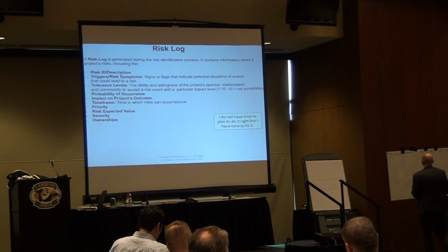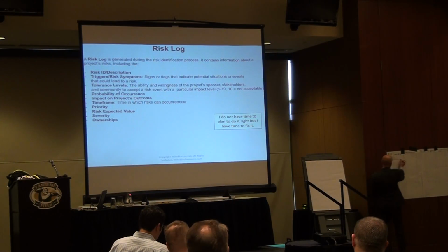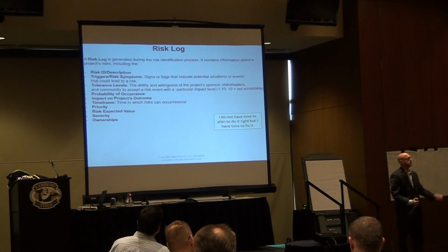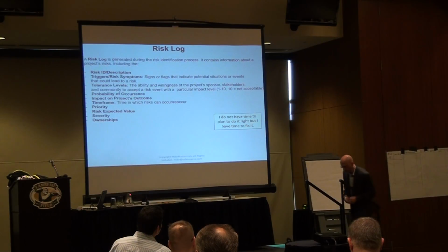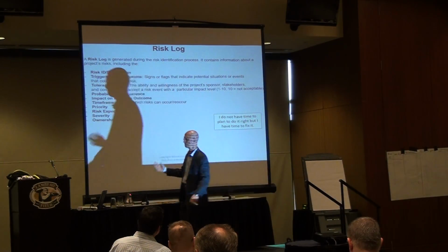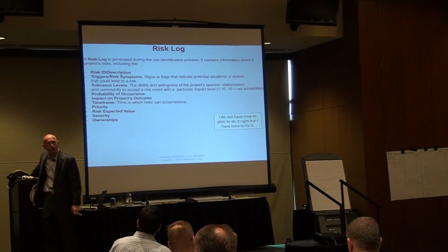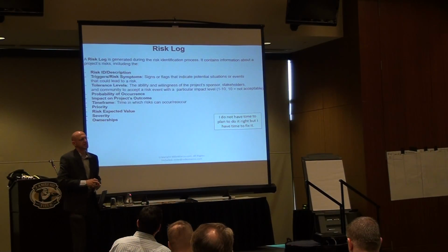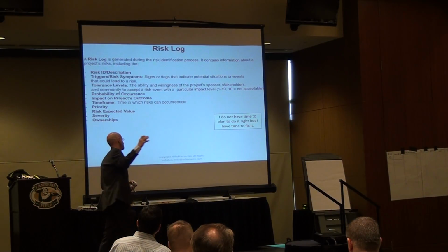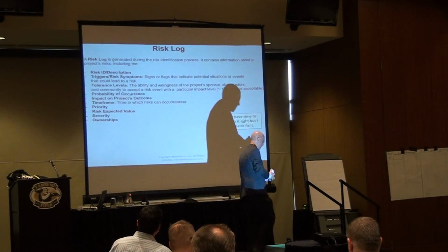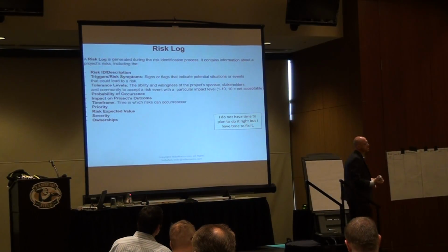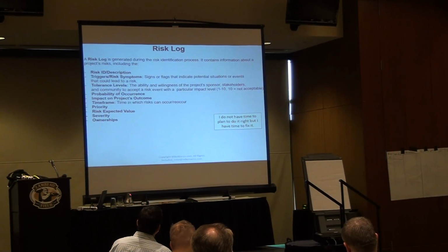So let's say, what document would I look at to establish my risk ID on your project? What document do I connect my risk ID to? That's pretty correct. The risk ID is everything. Where do I get my risk ID? The PMO. No, he doesn't even know what it is. WBS, work breakdown structure ID or task ID is your risk ID. That's how you connect the two.